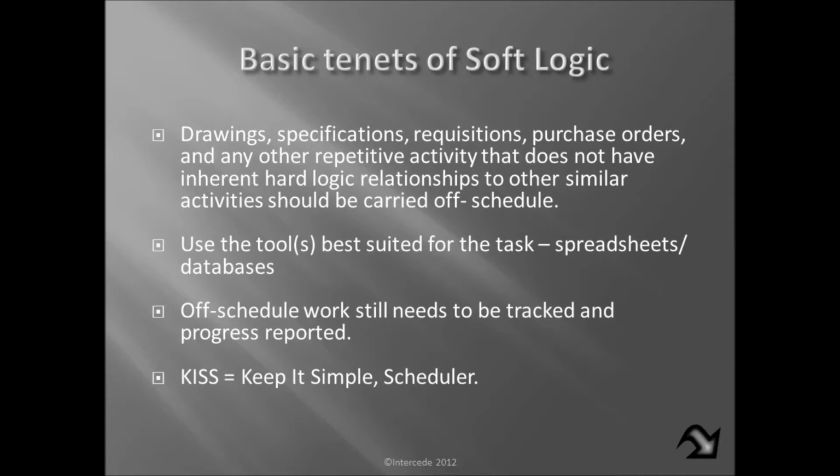I find most superintendents like the spreadsheet. Myself, I'm beginning to move more towards databases when I'm trying to combine all the information from these various spreadsheets. And the thing that kicks everything off is the estimate. So if it's in the estimate, we have to track it. And by that I mean anything that has a direct labor hour attributed to it. So anything that has a time variable component, we have to track.